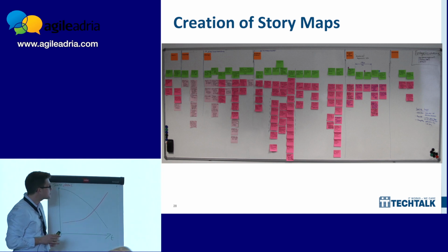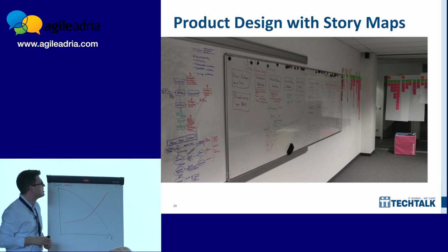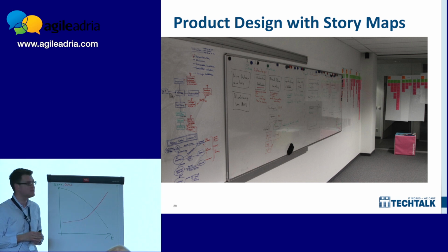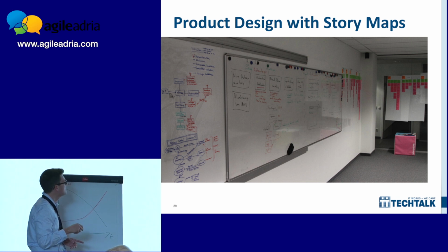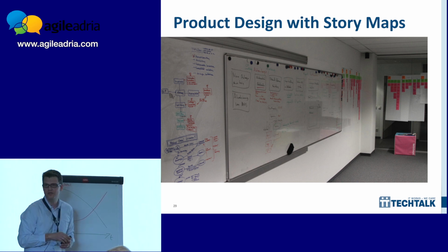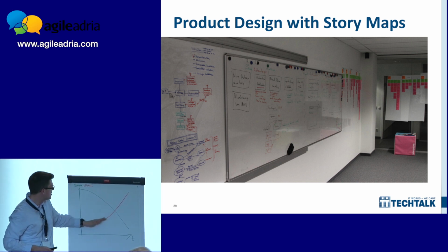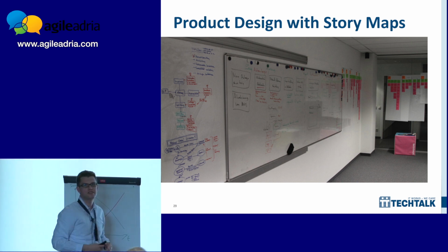And we use the maps also for designing. So this is in a sprint preparation, in a backlog grooming meeting, where we figure out the details for the next few sprints. So we took the story map and hung it here physically. Here you also have the map, and here we design some states and some UI scribbles where we try to carve down the details, get more details, make the story smaller so we can fit what we want to do in the next few sprints.